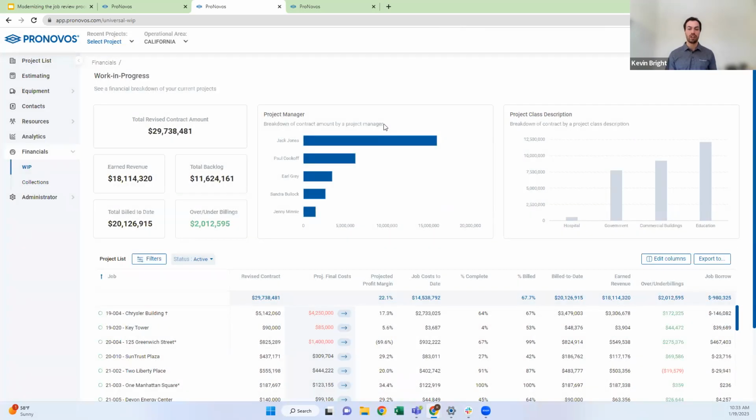There's a few others. One that we didn't have a chance to get into today is a dashboard that looks at change orders, and it will look at how your change orders have come across on the project and how that's impacted your profit margin. So let's say you bid a job at a 20% profit margin, but you can only submit change orders at a 15% markup. It's going to tell you, based on your approved change orders, how that has affected your profit margin on a project.